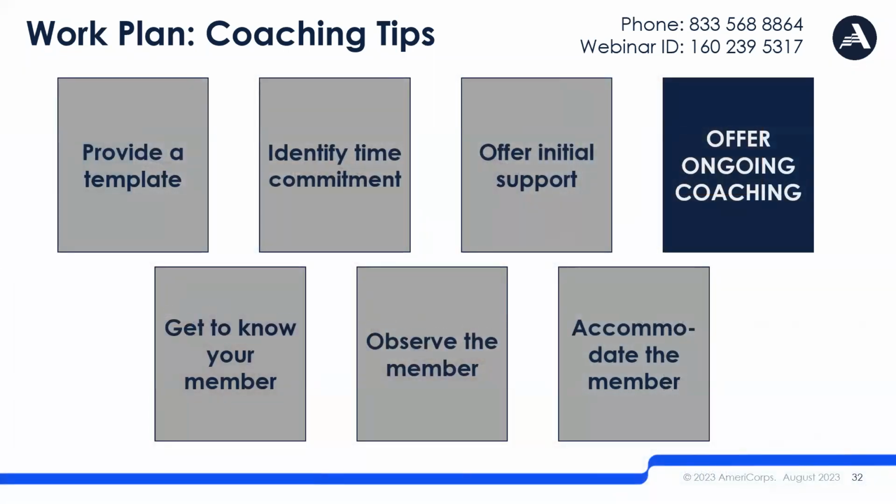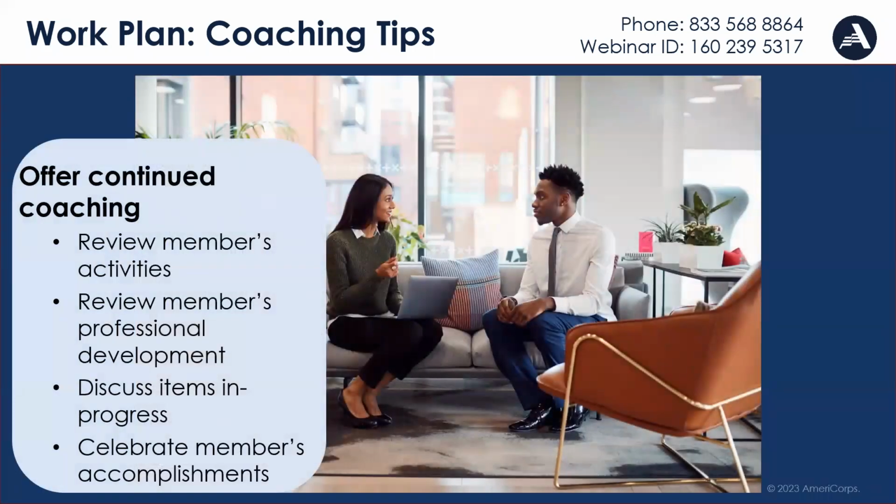And once the member's work plan is drafted, offer them continued coaching through your regular check-ins. These check-ins should reflect both your and your member's communication style and professional preferences to set the stage for the most productive collaboration. During these collaborative sessions, coach the member by reviewing and assessing progress of the member's activities against the project goals, reviewing and assessing progress of the member's professional development goals, discussing the in-progress sections of the work plan, what the member is actually working on, and offering suggestions to the member as appropriate, such as adding milestones or new activities, removing unnecessary milestones, or editing items like inputting updates to the member's professional development.